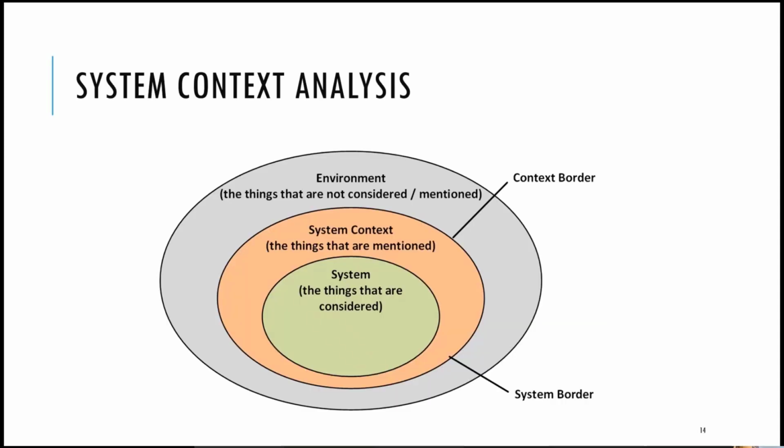When talking about systems, the system context is also crucial. It's important to analyze the context. What is the system, or, translated, what's in scope of the project? Where do you draw the line between what's important to know and what's in the scope of the project? The context means everything that's important for the system. That can be stakeholders, but also interfaces, other systems, everything that plays a role for the project. You also have to define where the line is, what you start to ignore, what's not important for the project and not relevant for you.